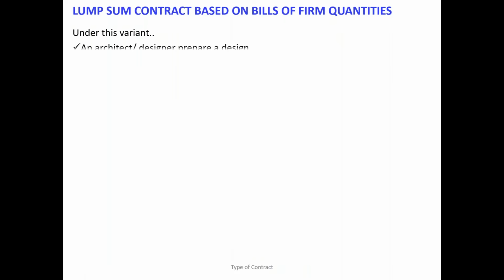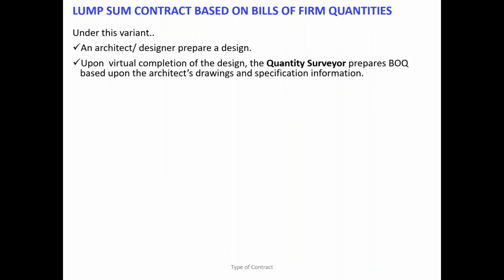So under this variant, you have to have the design, complete design should be done. Once you have done the design, the quantity surveyor prepares the BOQ, based on the complete detailed drawing and specification.